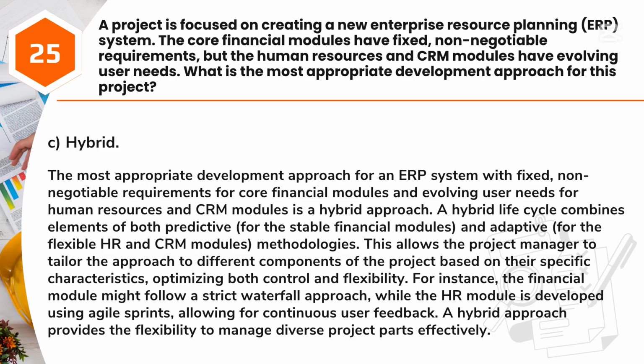For instance, the financial module might follow a strict waterfall approach, while the HR module is developed using Agile sprints, allowing for continuous user feedback. A hybrid approach provides the flexibility to manage diverse project parts effectively.